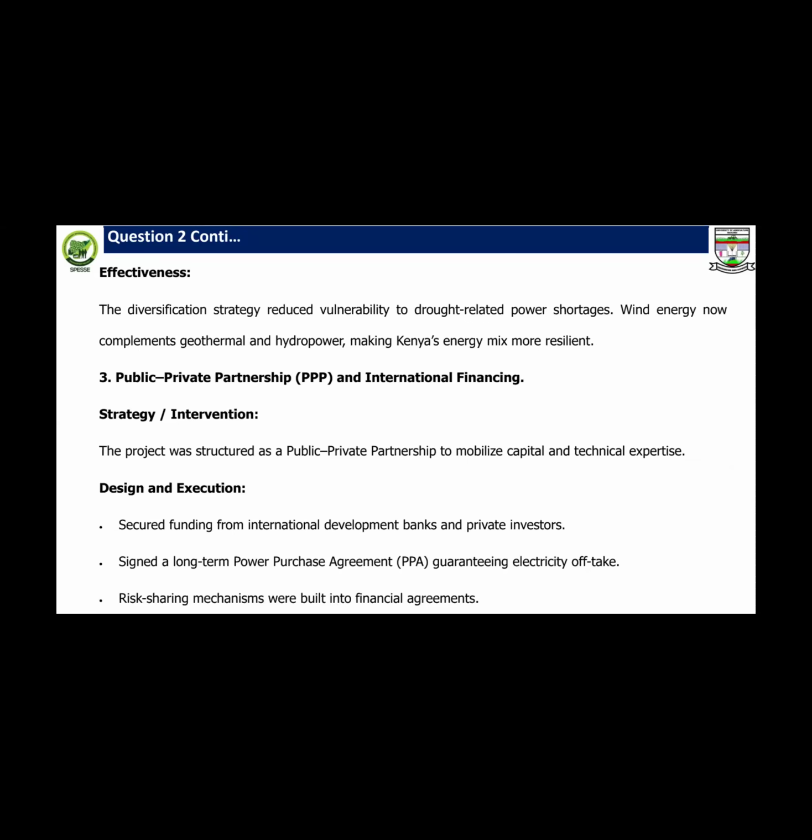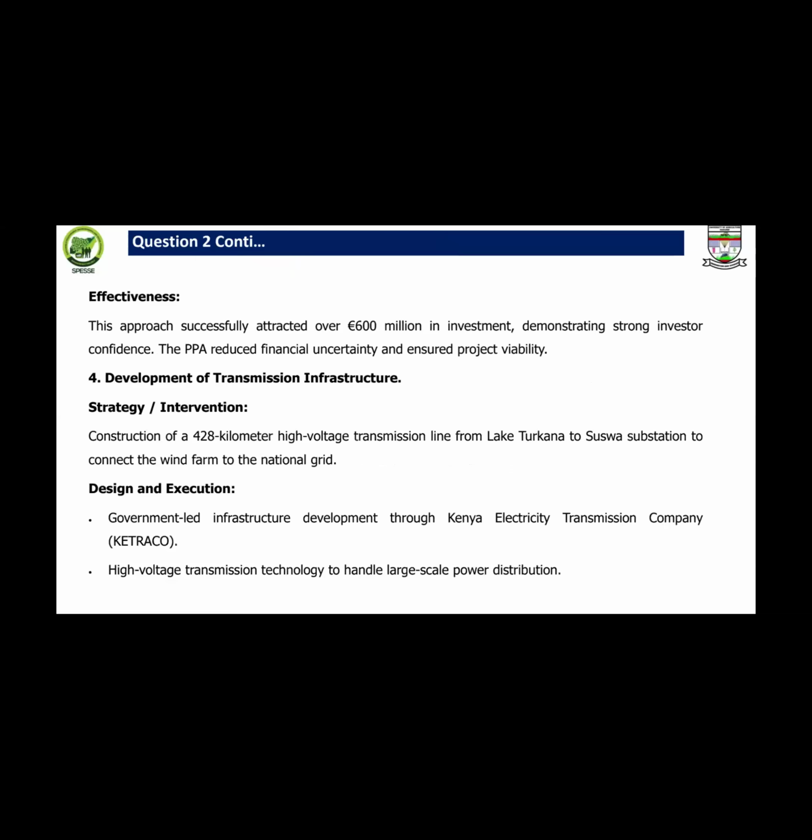Design and execution. Secured funding from international development banks and private investors. Signed a long-term power purchase agreement guaranteeing electricity offtake. Risk-sharing mechanisms were built into financial agreements. Next slide, please. Thank you, Tacha.